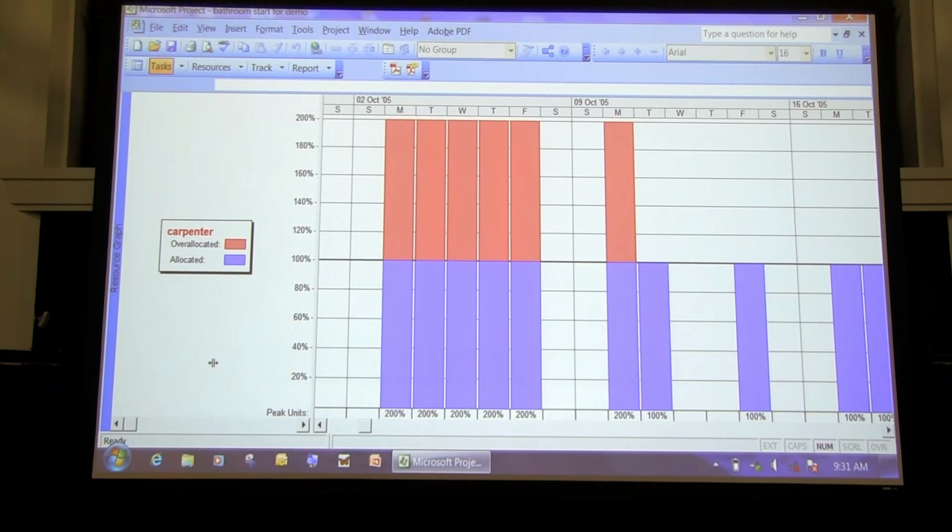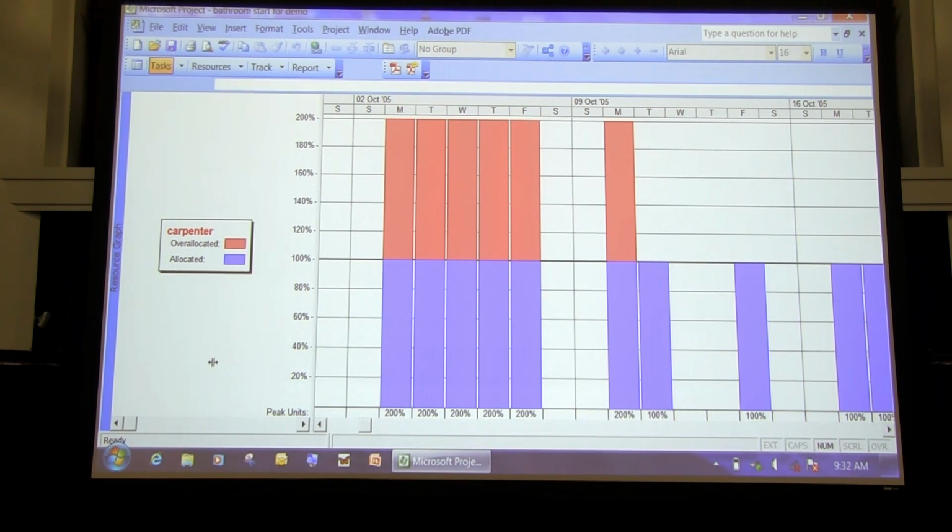And then the president would come again and say, I've got this other project, can you get it done by May? And the guy would say, oh, sure. What he really meant is if I took all my resources and applied them to that project, we could get done by May. But the one that needed to be done by April would then not get done by April. The president of the company just did not understand this at all.